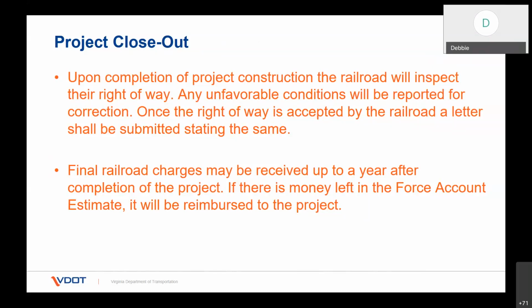If there's money left in the force account, the railroad will reimburse you once they have their final invoice. If it's something that's being charged to you, you'll have an invoice that will state this is your final invoice, and at that time, you know that you can close your project out.